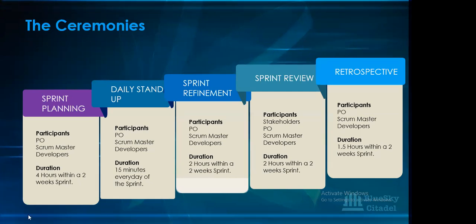So you will be having 10 working days per sprint. In those 10 working days, you will have your meetings every day. However, on days you have any of these major ceremonies, you don't need to have a stand-up. On the day of your sprint planning, you do not need to have a stand-up. On the day of your refinement, you do not need to have a stand-up. On the day of your review, you do not need to have a stand-up.